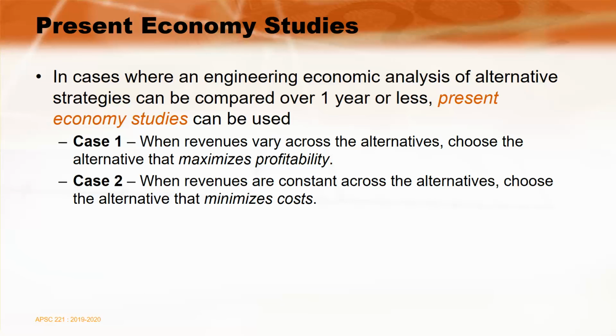When you're looking at projects that start and end within a year, the time value of money isn't as critical, unless interest rates are extremely high, which is outside the bounds of the type of material we cover in the course. But for normal, average interest rates, studies that are about a year can probably ignore the time value of money.